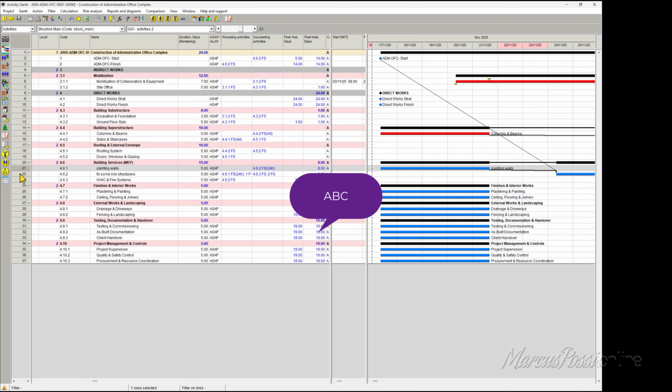But their calendar means we do not work every day, only on Mondays. So 3 days of lag means 3 weeks. This lag represents the waiting you have for the public department, which has its own calendar different from your project's. I think it's a very interesting and very useful feature we have in our Spider projects.